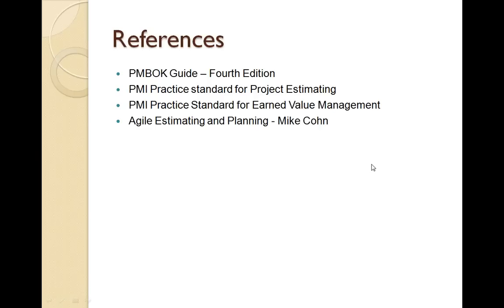And another better approach is, you not only have the risk management plan, you not only have a textual representation or quantification of the risk, but let's say you have considered the risk probability and severity. So you have a quantified number for the risk. Now you use that to convert into estimates or extra efforts as well. Which means if a project's probability and severity is very high, then I will need to reserve extra time as a contingency for managing that risk. So that either becomes a part of my estimate or gets added to my estimates as contingency reserve, or as buffer or padding of the project. So it is always in line with the risk scenario or risk profile of the project.